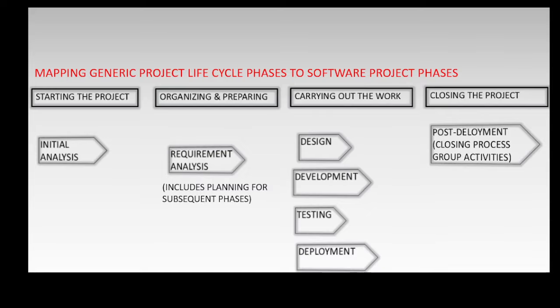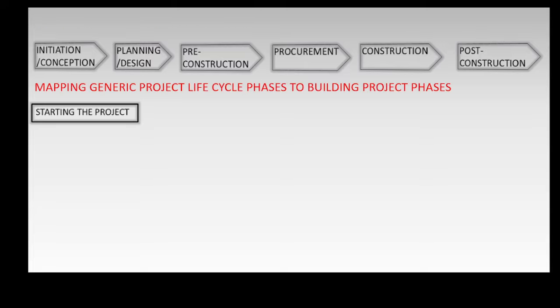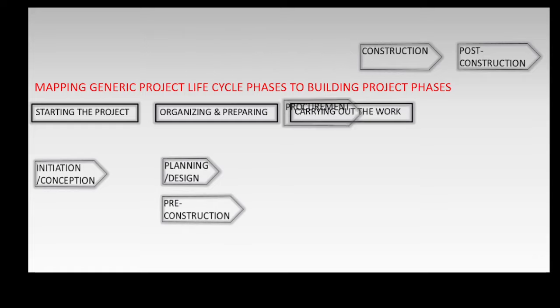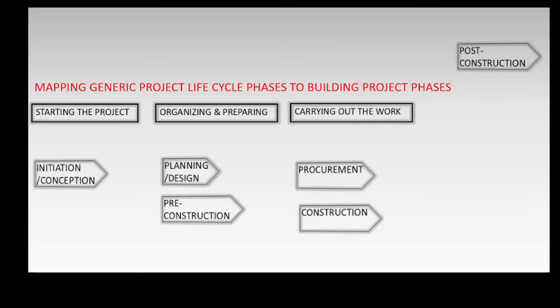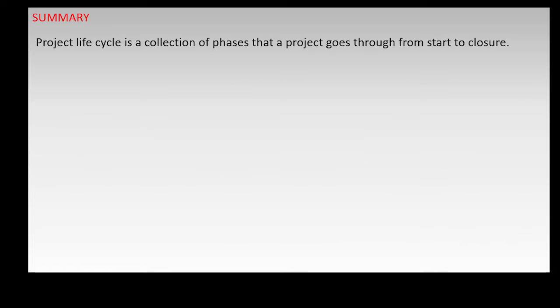Likewise, the specific phases of a building project are: initiation/conception, planning and design, pre-construction, procurement, construction, and post-construction. The mapping between the generic project life cycle phases and the specific phases of a building project are: starting the project is mapped to initiation/conception; organizing and preparing is mapped to planning, design, and pre-construction; carrying out the work is mapped to procurement and construction; and closing the project is mapped to post-construction.